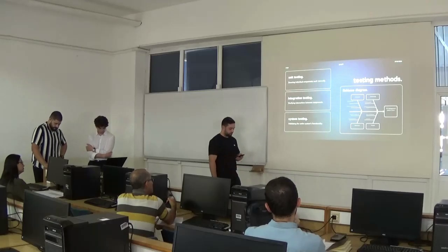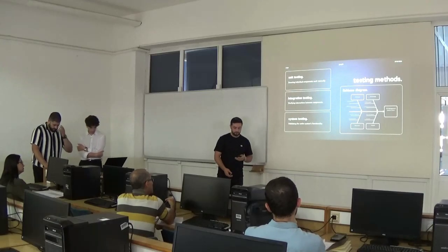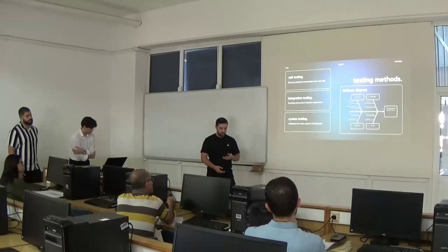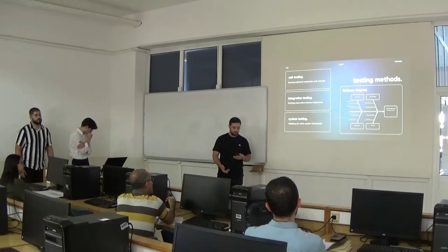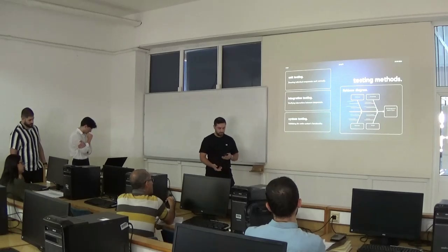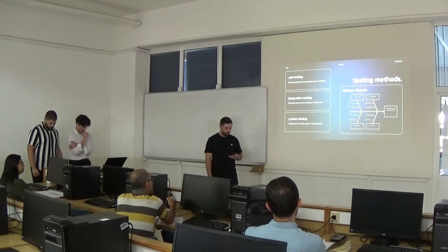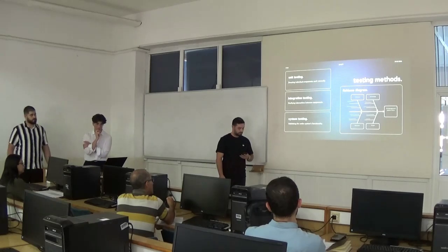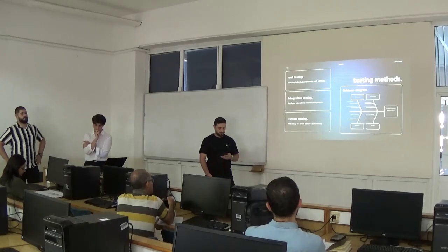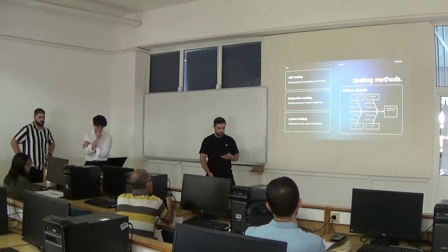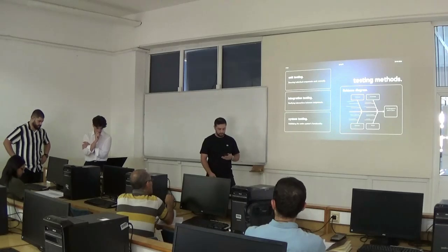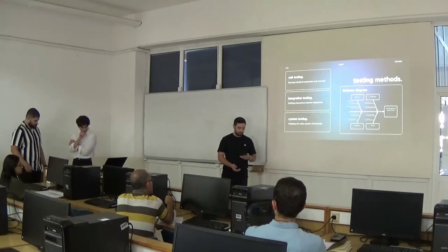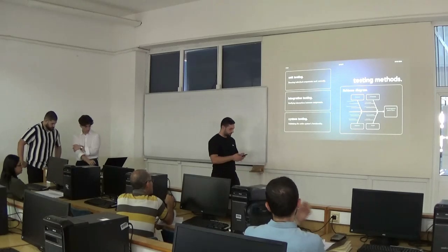Then there are technology risks. These can involve system failures due to outdated hardware or software incompatibilities. For instance, relying on outdated hardware might lead to unexpected system crashes. Finally, we have environment. These include external factors such as changes in regulatory requirements or market conditions. For example, new compliance requirements could impact our project timelines and add unexpected costs.